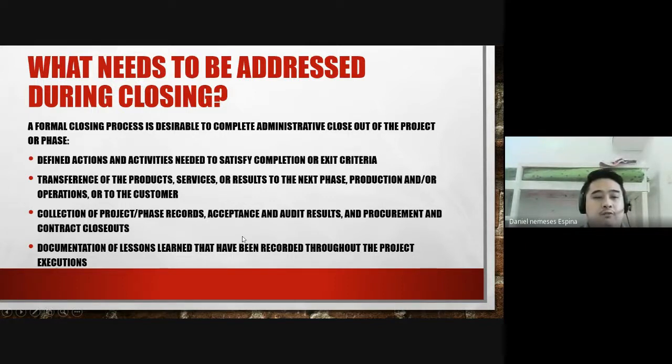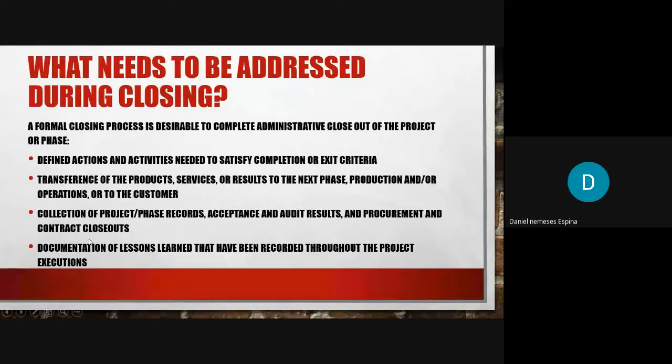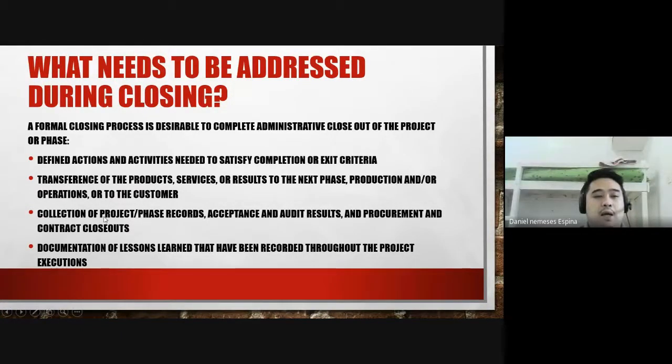Collection of the project or phase records, acceptance and audit results, and procurement and contract closeouts. So all documents that need to be kept, okay? So don't just throw away all the documents once the project is done, okay? These documents will still be used, okay? And of course documentation of the lessons learned that have been recorded throughout the project execution.